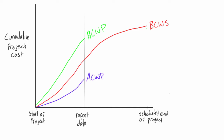BCWP will sometimes be above BCWS, sometimes below, and ACWP can vary too — I just picked a random orientation for them. With these three values — the budgeted cost of work scheduled, the actual cost of work performed, and the budgeted cost of work performed — we are able to get the cost performance index, the schedule performance index, the cost variance, and the schedule variance.